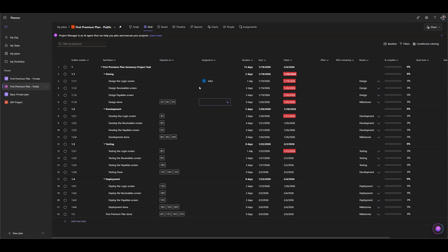So I can go here now, okay, and put, you can see it is 8 hours are calculated. So I can put here Ellen and, for example, John, and you will see that they have 32 hours. So I'm not going to bother you with putting all resources, but when you put all resources, you will have your total efforts.